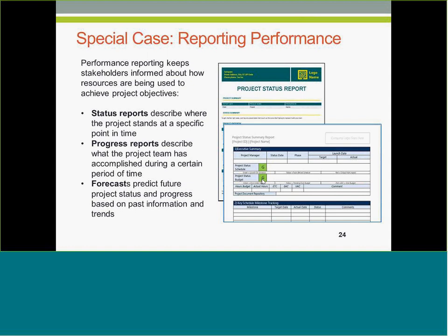Green always means everything is okay and running well on our project. Yellow means we have some risks or we have some problems that we need to talk about, that we need help with. And red, of course, means that we're behind schedule, we are over budget, and it's not going to be fixed within a week or two or within even a month. So this is our status report template for the course.